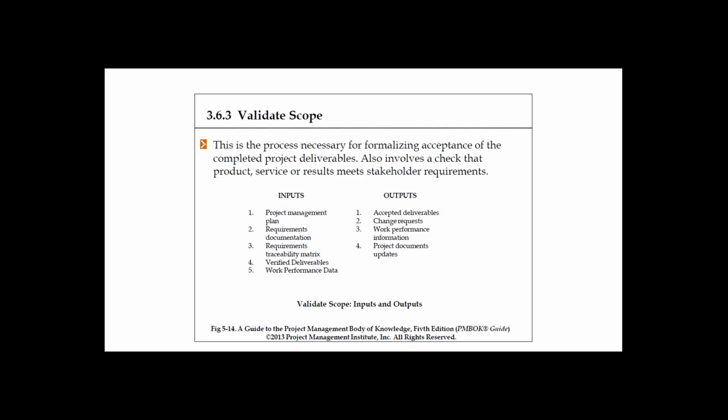Verified deliverables means you have your deliverables generated, but as part of the standard process you get your deliverables reviewed by your lead or whoever is assigned. It can be a peer review as well, but those deliverables need to be reviewed by your peer or next level. That is called verified deliverables. So that means the first level of verification is already completed.